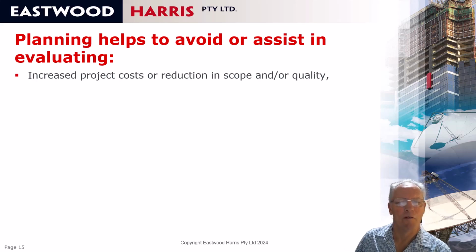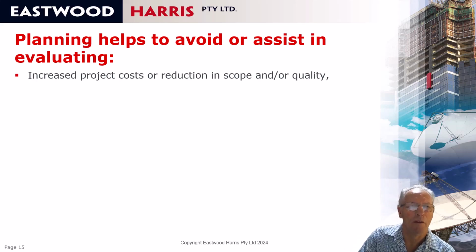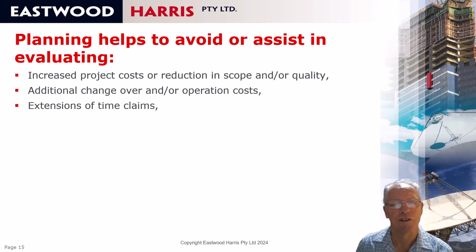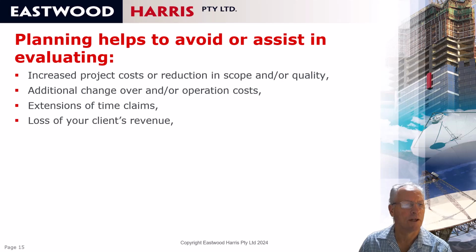Well, first of all, if a project isn't planned properly, then often scope is omitted, and as the project progresses, the costs increase, or there's a reduction in scope or quality to try and keep the project within budget. Also, there will be additional changeover costs. Often when a project is late, then it's handed over incrementally, and that increases the handover cost and the operational cost. You'll also get extension of time from your subcontractors who have been impacted by the delays in the project.